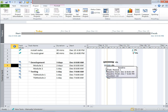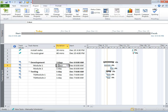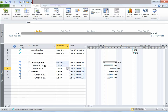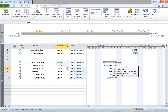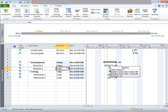Once I do that, notice there's a gray bar which has appeared right under these shaded blue bars — this is my baseline bar. Now let's say I'm going to increase two days to three days for Module 1. The programmer was absent and it took one extra day. I'm going to change that to 3, and when I hit Enter, notice what has happened to the tracking Gantt chart: the blue bar has increased by one day. However, the baseline has remained the same because it represents our planning stage view.